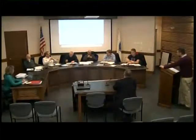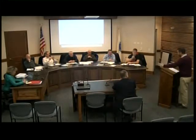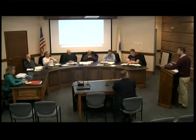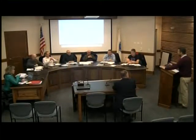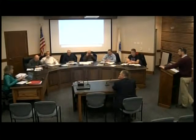Just two things that are in the decision, I don't know if you saw it. Us having a pre-construction meeting with a committee of the Conservation Commission, which you agreed to. Just as per the commission's policy, we have not seen a draft of the final order that you're going to review tonight, but through my discussions with Jen, it sounds like the conditions are very similar to the ones that we worked on together and that we were comfortable with. So that was the condition you wrote up. You said pre-construction to do the SWPPP, but I called it to work on the construction sequencing. Sure. And you had put in there the language that we had talked about, that we would discuss when stormwater structures came online, as well as the very initial phases with the construction of the walls and the sedimentation ponds and those things. Right. And then I think we also agreed that Lisa Eggleston could be part of those discussions.